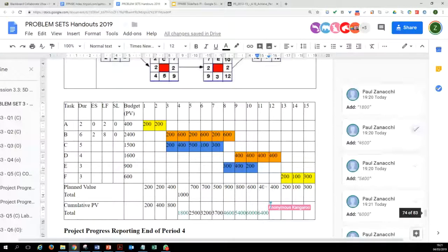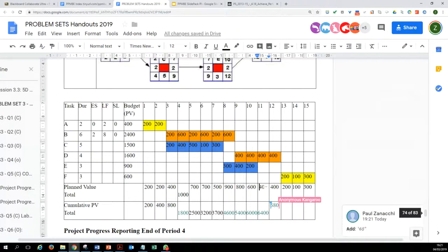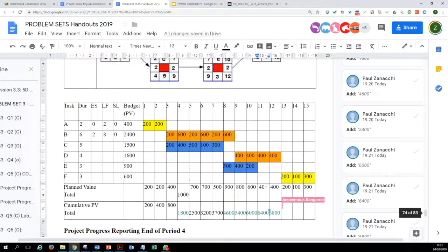As a good project manager, we need to be aware that good practice is not to change our planned value line or anchor point just for reasons like weather-related delays or small scope changes.